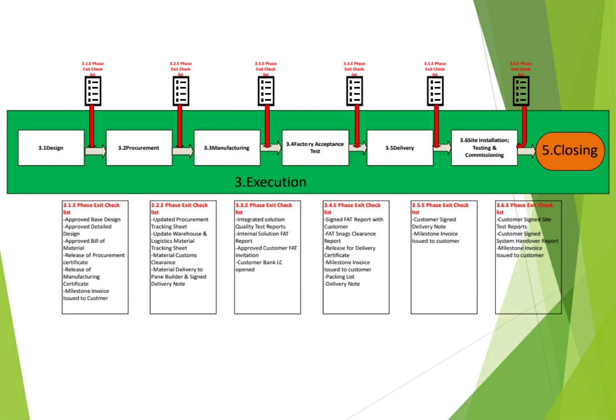After that, we'll proceed as we mentioned with the project planning, where the output of this is mainly the baselines, so scope baseline, cost baseline, and the project time schedule baseline with the communication matrix, organization chart, weekly progress templates, monthly progress templates, and so on. After that, we will proceed with the execution, and as we mentioned, some activities for the execution can start with the planning. So we'll start with 3.1 design.